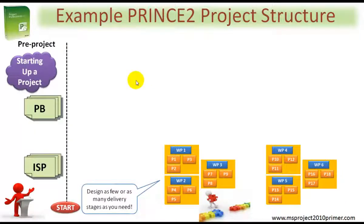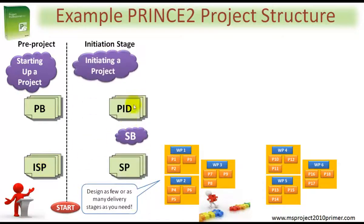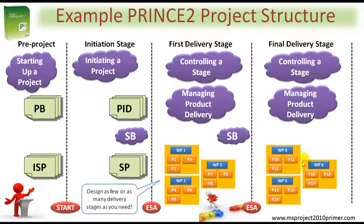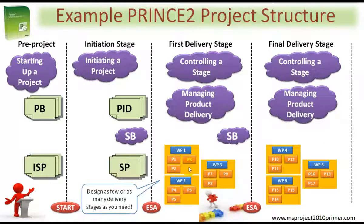Here's an example of a typical PRINCE2 project. You have pre-projects with the project brief and the initiation stage plan, the initiation stage itself, the creation of the PID, and the plan for the first delivery stage. As you're into each delivery stage, you need to control a stage and manage product delivery, which is where your work packages will come from. We need to use the managing a stage boundary process before entering into the final delivery stage. I've got all of these aspects covered in my Microsoft Project 2010 templates. You can mix and match, designing as few or as many delivery stages as you need. At the end of the last stage, you'll need to close the project down in a controlled manner, and I've included the closing a project process as one of the many modules.